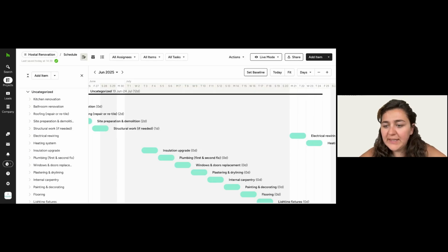Any way of highlighting the extra dates, or I meant holidays, in the future? So yes, basically you can set up your workday exception here. Sorry, workday exception. You can go there, and then you can add several holidays. Obviously, I picked July, but you can add them in here. And if you want to change the year, like you have 2026, then you can add all of those dates, 2027, and so on. And you can add exceptions